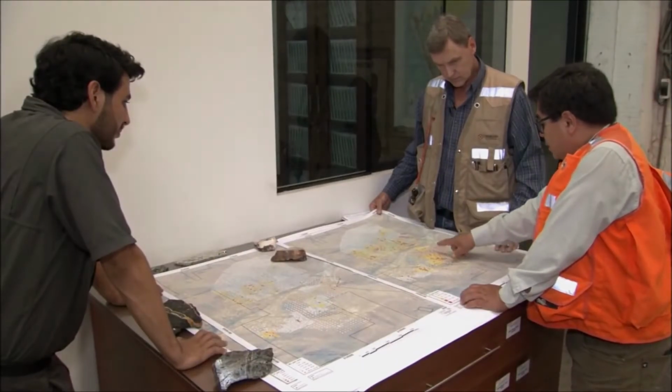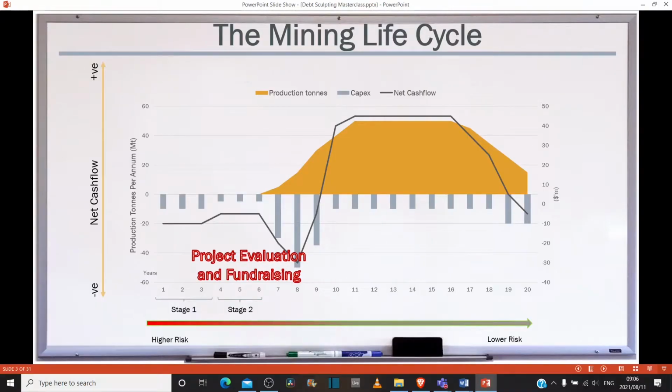You could have an ore body that's very nicely uniform, and that's very good because it provides a certain amount of stability for the mine. You know what to expect. But how are you going to discover that if your drill holes are quite a large distance apart? In your early studies, obviously, the more you drill, the more expensive it gets. So you might not have that much confidence in the early phases of your development studies because you haven't drilled enough cores. As you increase the confidence of your ore body, you do so by drilling more and more holes such that you've got a clearer picture of how your ore body actually behaves.